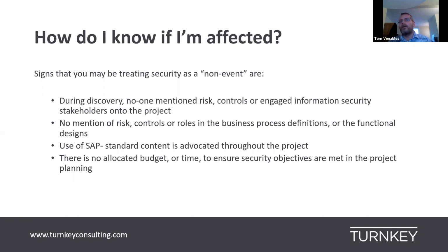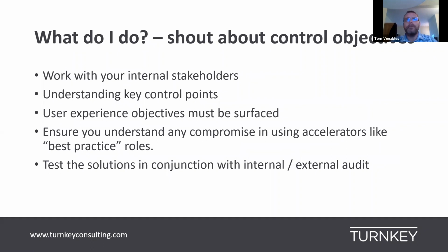You'll also see a lack of that language in the business process definitions or the functional designs. It won't be called out as what are the key restrictions here, what's the user experience. You might see that people have described the SAP standard content as an accelerator and advocated it strongly throughout the project without necessarily articulating to you the challenges that brings. And again, you might not see budget or time to ensure security objectives are met in those project plans.